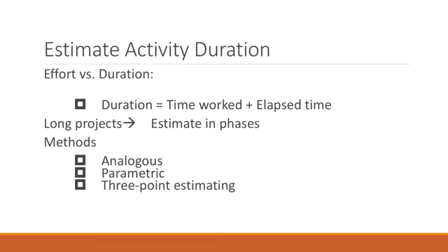However, when you think about duration, I need to combine the time it's going to take me to teach the class plus the time it's going to take me to prepare this particular lecture. That's going to be the duration of the task itself, which is to deliver an hour and a half session on project management. So the combination of those two, the time that has been worked plus the lapse time, is what makes the duration. It's not only the effort, and that's something I cannot stress enough, because it's really important for what you are going to be doing in assignment number 2.